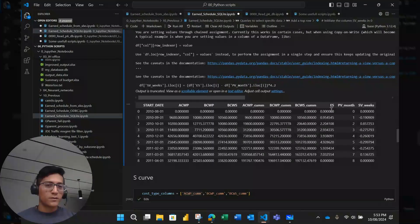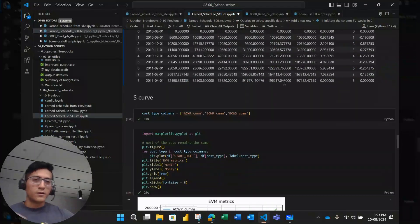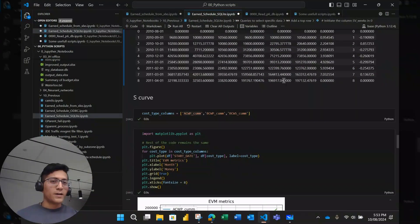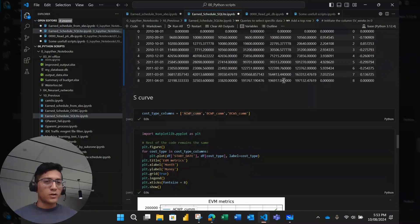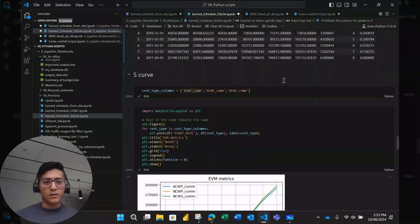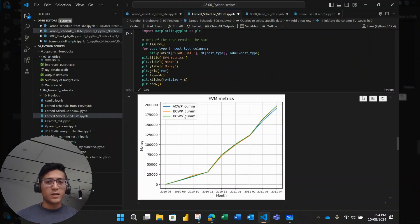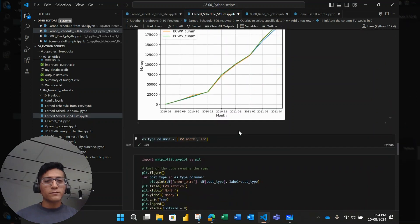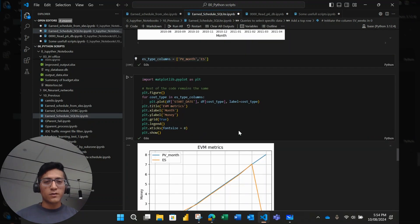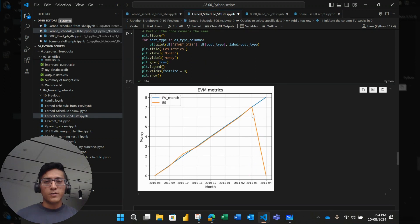And you can notice I haven't used XER a lot in this whole process. I'm just going straight away to the database of P6. And then we can draw some graphs like the earned value matrix, actual budget, earned value and planned value. And also we can draw, sorry for the mistake here, but anyway, we can draw here the earned schedule against the planned value month, which is 1 for each month. And I really find that Python is a large tool.